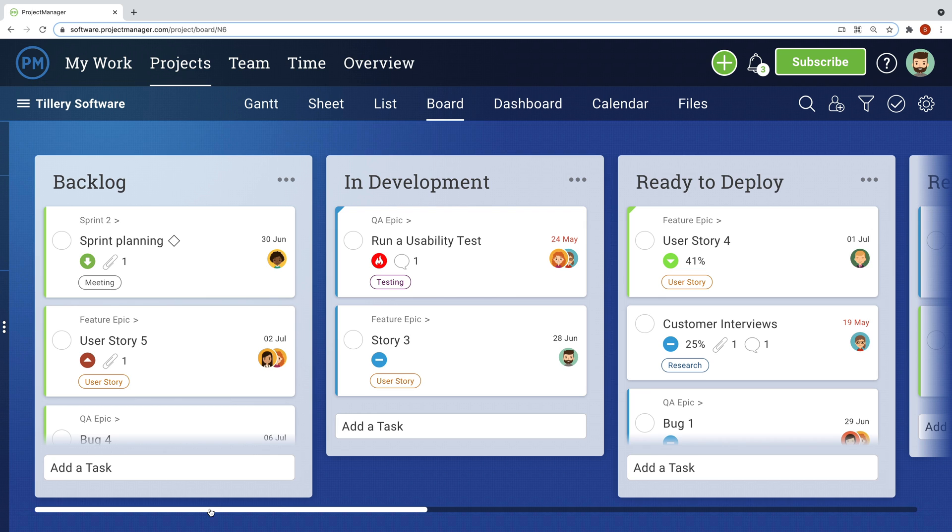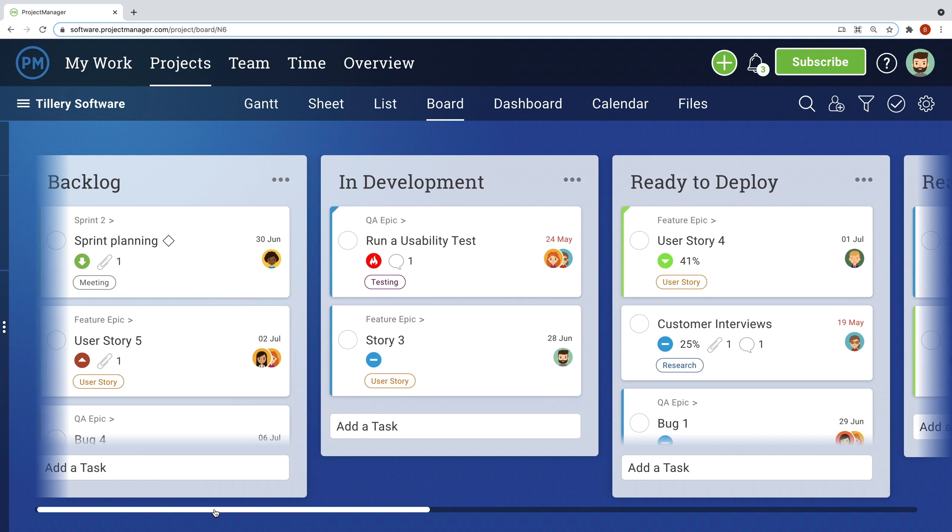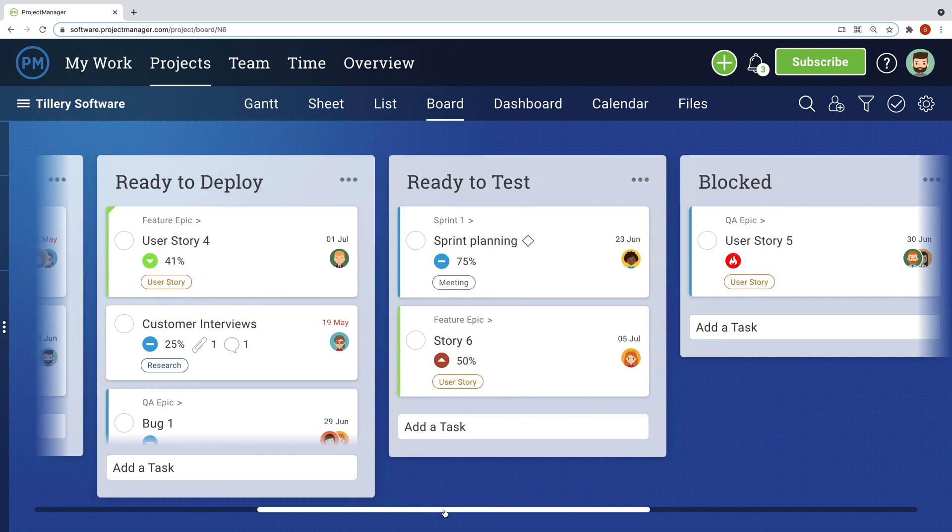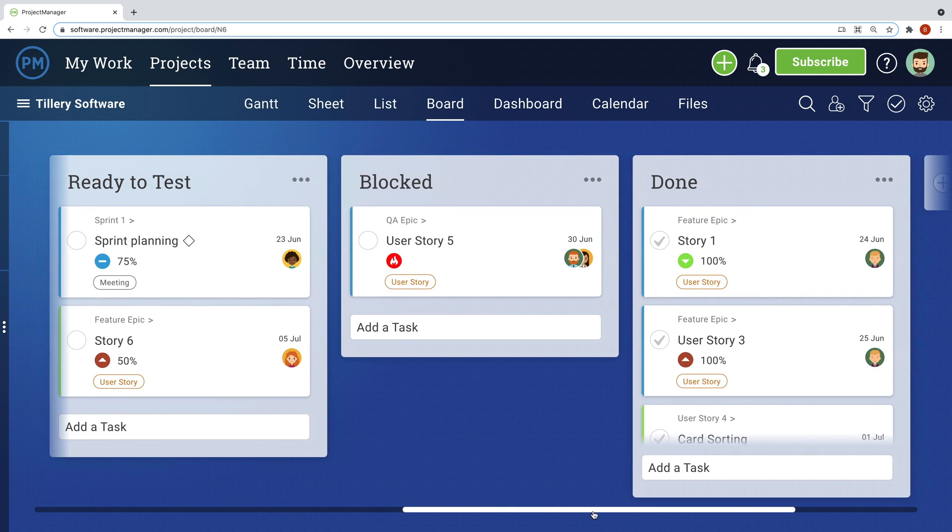The board allows you to build customized workflows so you can see blockers and track task progression. For example, a software team wants to use Project Manager to track sprint progress. They have customized their columns to represent different phases of their project: Backlog, in development, ready to deploy, ready to test, blocked, and done.